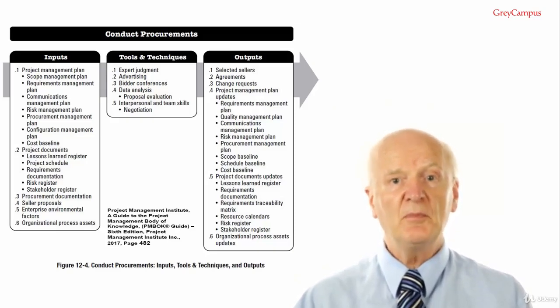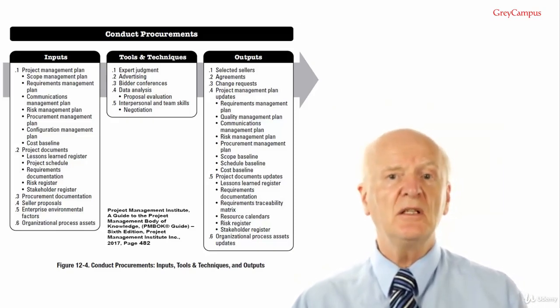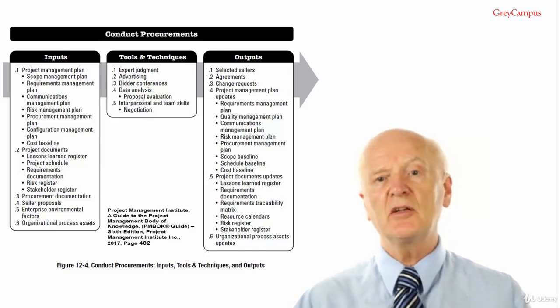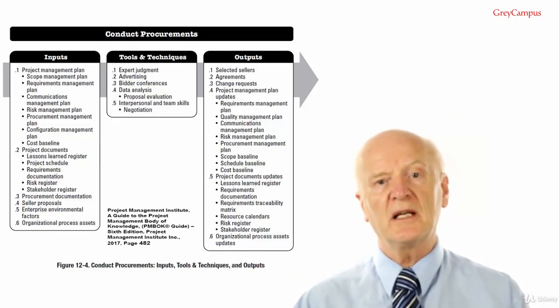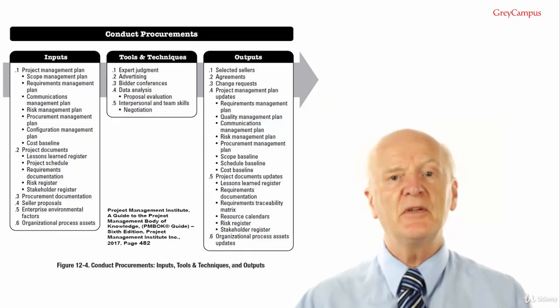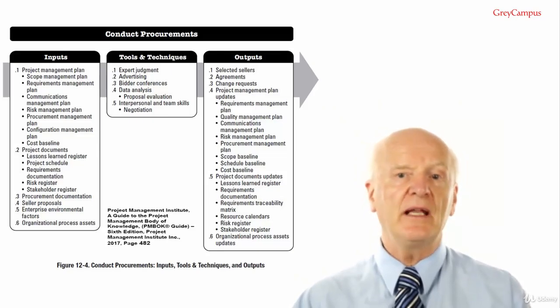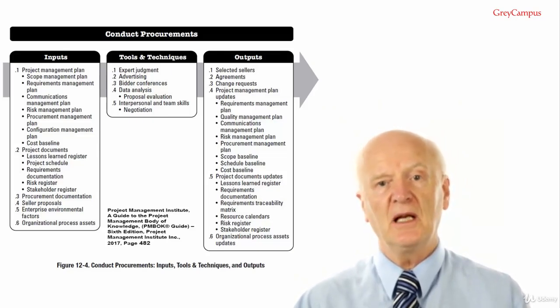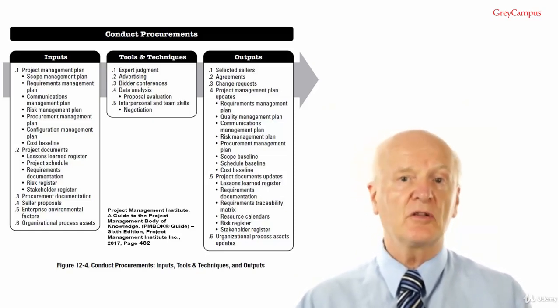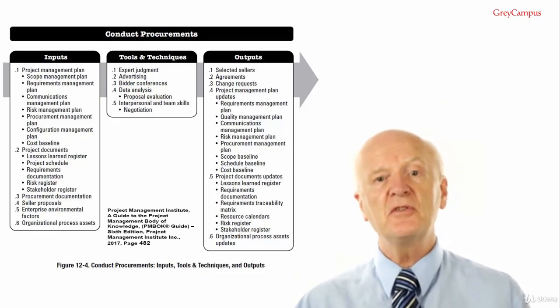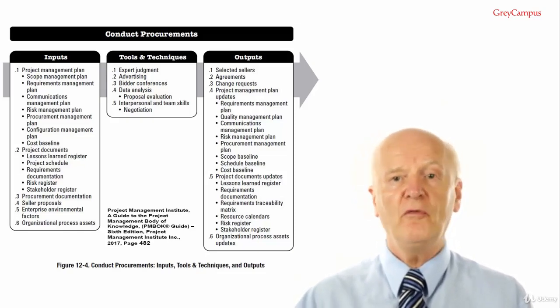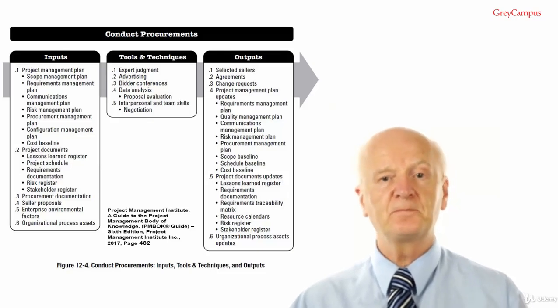For the exam, please note, for risk mitigation, the buyer might decide to sign agreements with more than one seller to mitigate damage caused by a single seller having problems that impact the overall project. The buyer might decide to sign agreements with more than one seller for small deliverables to assess them in action and later choose the best performing seller for major deliverables.